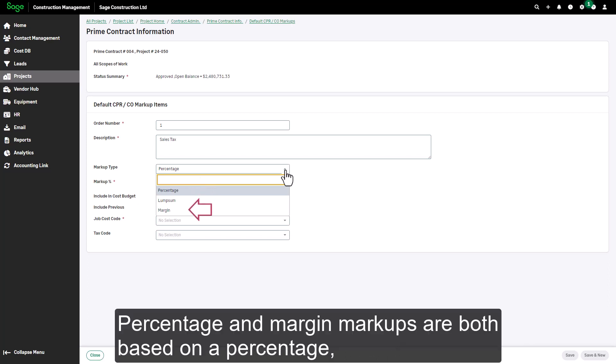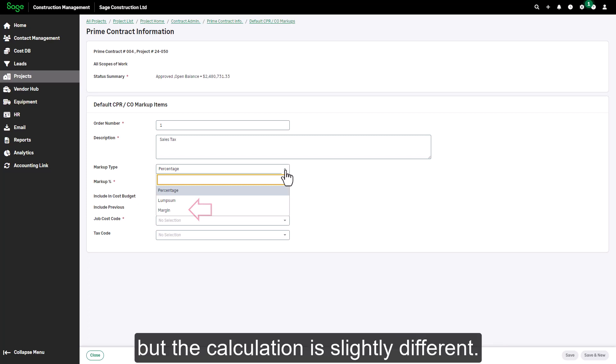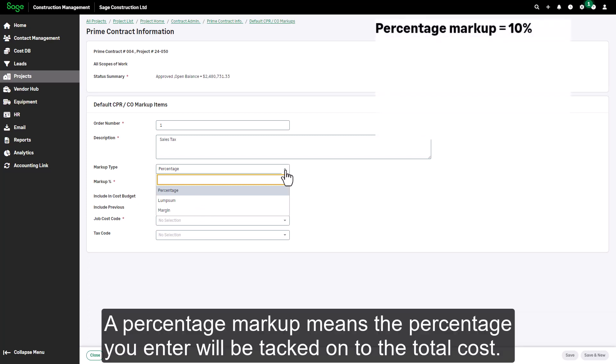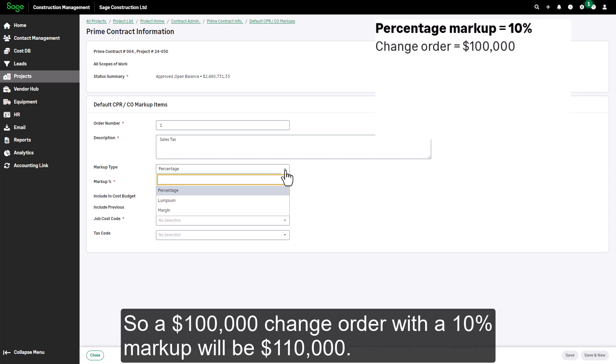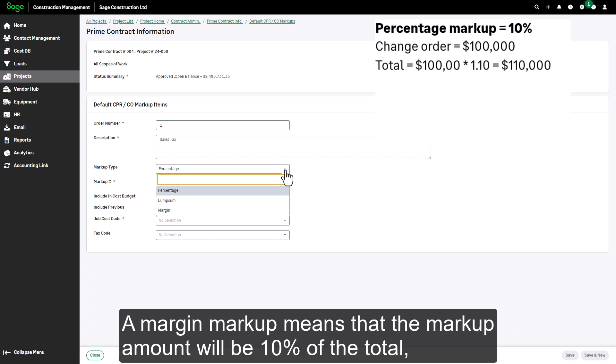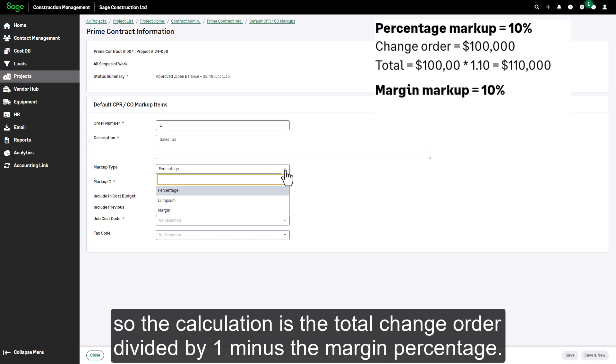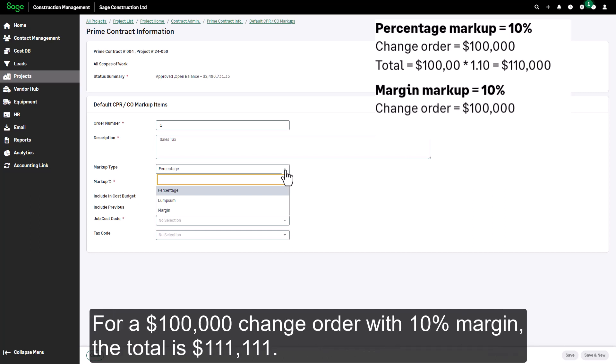Percentage and margin markups are both based on a percentage, but the calculation is slightly different. A percentage markup means the percentage you enter will be tacked onto the total cost, so a $100,000 change order with a 10% markup will be $110,000. A margin markup means that the markup amount will be 10% of the total, so the calculation is the total for the change order divided by 1 minus the margin percentage. For a $100,000 change order with 10% margin, the total is $111,111.